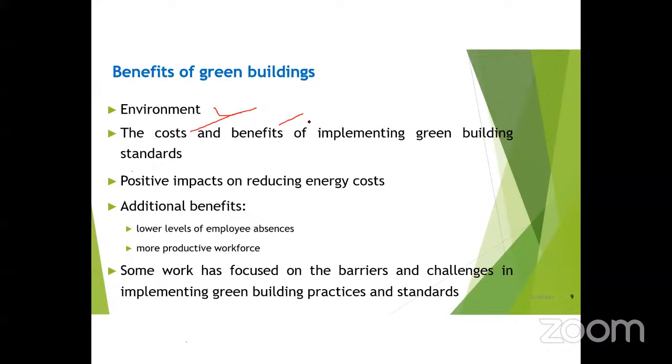Whenever in the summer season, we do maximum site construction. In the summer season, we sprinkle water in between on the site area to minimize the dust coming out from the site. So we are focusing on less pollution during as well as after the construction.